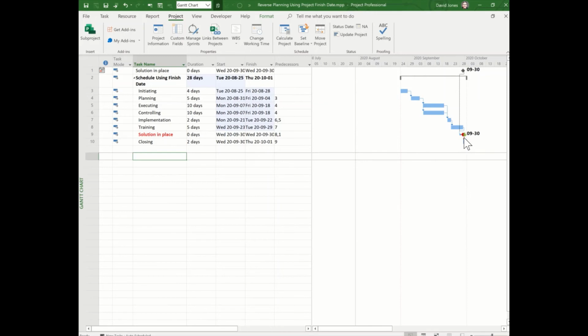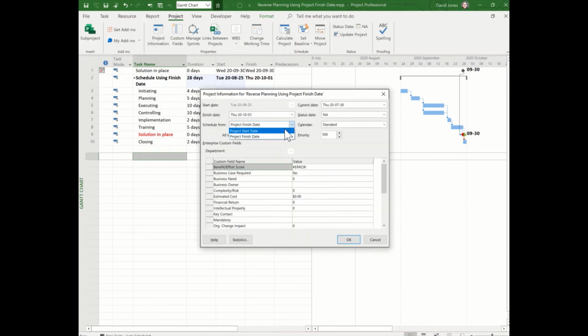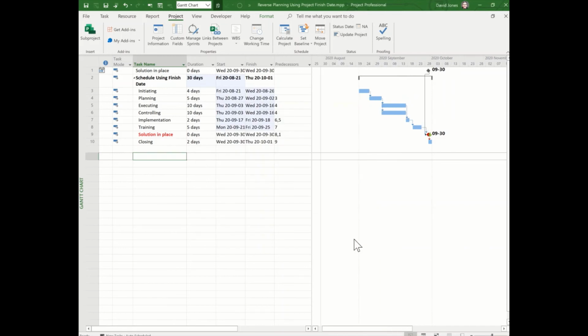This is an effective method of building a schedule as you would normally do with finish to start relationships and as soon as possible constraints, so nothing weird here. Also, you can get back to more normal by changing the scheduling back to the project start date. We can select here a schedule start date that gives you a little bit of contingency. Now you can tune your plan, and when you've landed on your schedule and it's all resourced and you have your agreement from your project team and sponsor, you'd baseline your schedule.